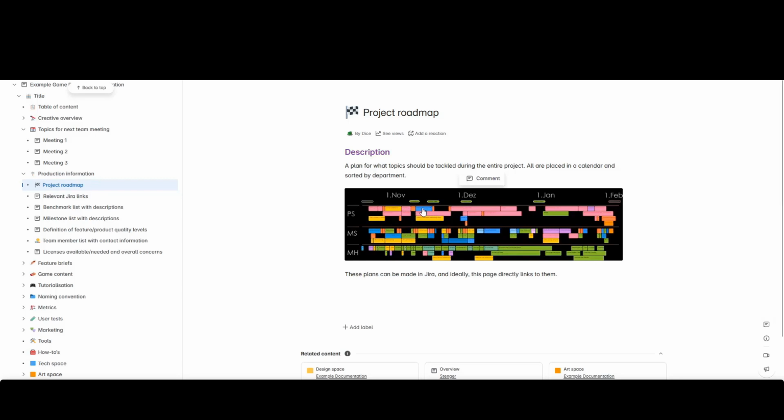This also works really well if you divide your team into focus groups. So if you have different teams, smaller team compositions that tackle specific topics, now you can put these different topics into your project roadmap and you know when each of them should be completed. The big advantage of this type of roadmap, or generally of having a roadmap, is that you can see when you don't match your time expectations, which means you usually have to rearrange something or throw something out, so you can make sure that the game still stays on track for its actual development.